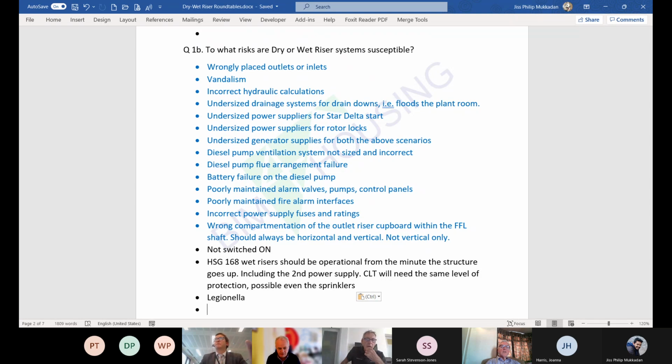There's a misconception in the industry that people take the BIM model, hand it over and then add to it, whereas actually, certainly from an M&E perspective, they tend to go back to first principles and remodel it. I don't know if everybody's aware of that, but that's certainly the case.